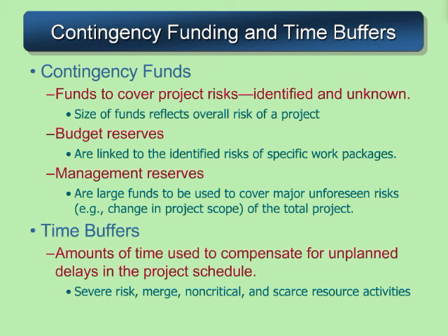Time buffers are used to allow for activities that might be delayed, and that those delays would actually cause the project schedule to be delayed. They're put on activities that have high risk, activities that merge into the critical path, non-critical activities that are near the critical path, and any particular project where scarce resources might cause the project task to be delayed.